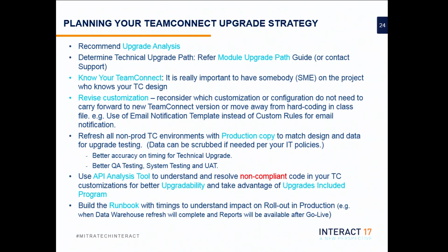Then the next thing is refreshing your non-production environment with the production copy, because it helps in a lot of ways for doing the correct TeamConnect upgrade, and also for better testing. Your QA testers are able to do the testing with correct data. Your UAT users are able to gain confidence, and they can use TeamConnect the way they use the production environment, so they can compare it with production and find out if there is any difference, even time differences, if they are seeing any slowness.